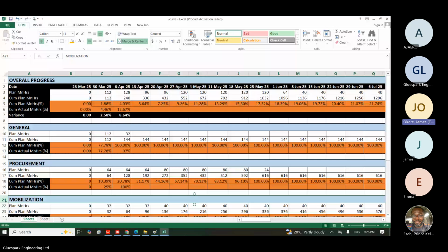All right, any other question from here? This is pretty hard to update and to get each level. Remember why we did this Excel part yesterday, in our last class: we actually needed to get the plan, and we find it difficult to get an accurate plan from PCs. So that's why we did this. You find out that our plan here is 4% and we are doing 12%. In the upper week 13, we plan 7%. So we are already ahead of schedule.